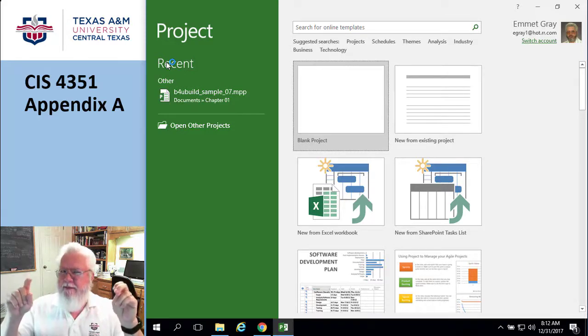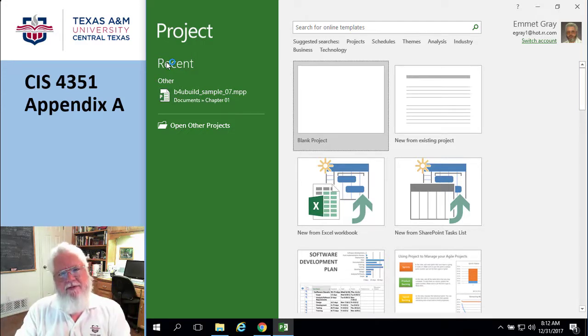So there's kind of an art form in figuring out how far a WBS ought to go. Now, I would not combine tasks that require different skills. For example, I would not say hang sheetrock, run electrical cables, because most likely the guy running the sheetrock is not going to be a licensed electrician. So those I would have as separate work breakdown structure.